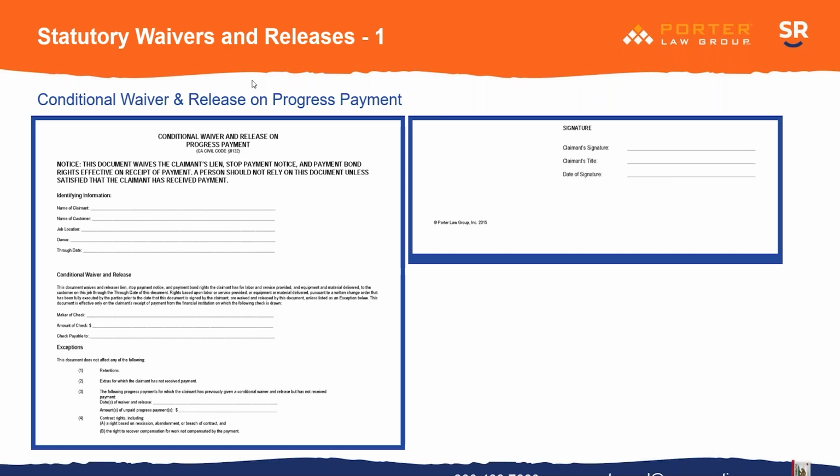Should I put $50,000 for this release, or 20 or 30 or what? Instead, you would do it for the, let's say, 30 that you're owed now, and then below down here you would put in the 20 that you did one of these for the previous month, let's say, that you still haven't gotten the money. So looking at both of them, you can see the total amount owed is 50.